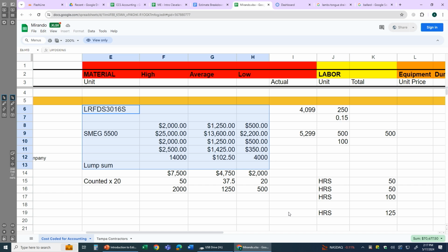And it might make sense, instead of adding escalation like we talked about, say you have copper pricing, you might just show a range. Give a high price per square foot, or however you order, maybe in tons. I'm not sure how you're ordering it, but give a high, give a low, and give an average. It's okay to include that in an estimate, and just in your assumptions show that you've included average costs based on the range.